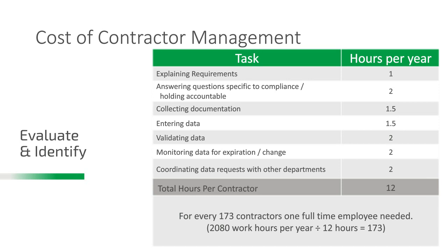I mean, we can debate whether it takes 1 hour or an hour and a half or 3 hours or half an hour for each of the elements. But what we found looking across a number of different clients is that it takes roughly 12 hours per contractor per year to appropriately vet and follow them.